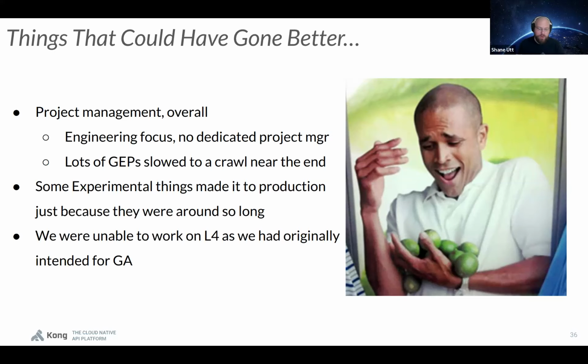So action items. All these things that didn't go well, and this wasn't an exhaustive list of what we covered in our retrospective either. But one thing we did during this year, and the reason why we called it the Road to GA, is we literally had a project board. It's finished now, but this is one of the ways in which we got ourselves organized and actually triaged things properly as they came in, giving them priority.